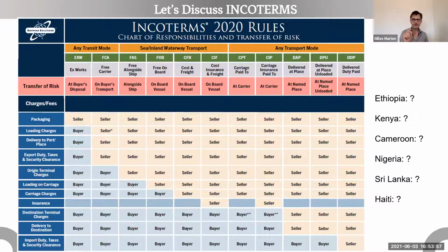And those moments in your supply chain where the responsibility over the product is being shifted are key events. Once you've designed your supply chain, once you've agreed on your Incoterm, there are some of those events that you will have to track, so that when you communicate about product availability, and about the flow that the product is following, those specific events are moments that you will follow.